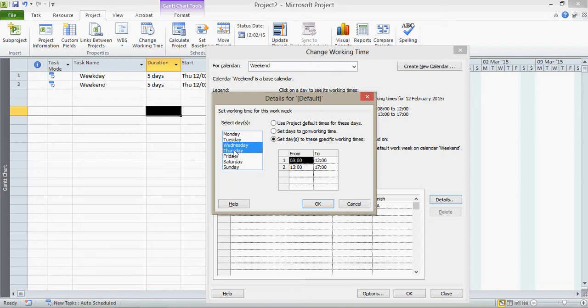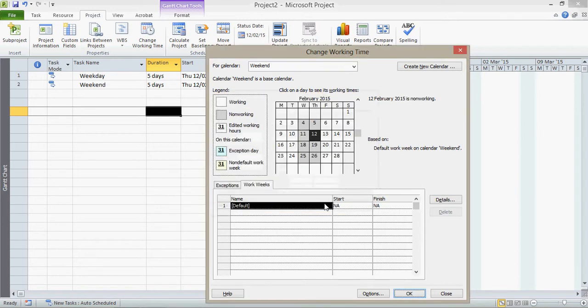So in this instance, on Wednesday and Thursday, the people who are working weekend calendar, that's effectively when they have their weekend. So I now set those days to non-working time. Click OK. You'll notice how now effectively their weekend takes place in the middle of the week, but they can now work on Saturday and Sunday. They are counted as normal working days. So we click OK.